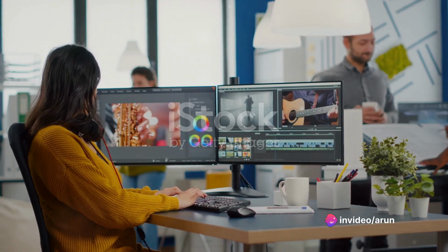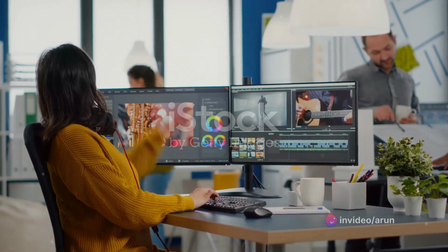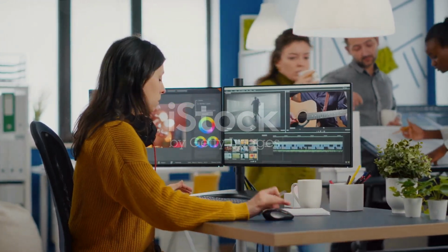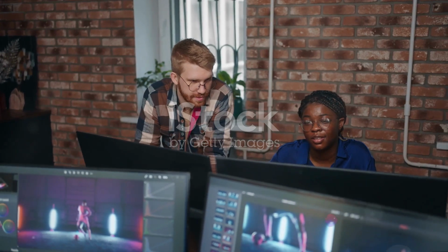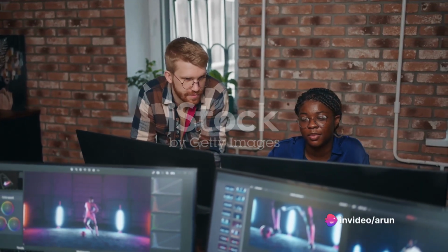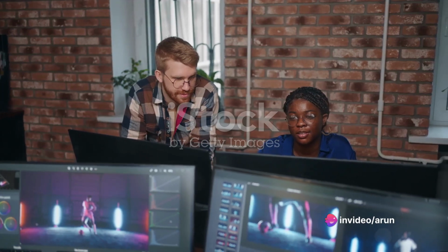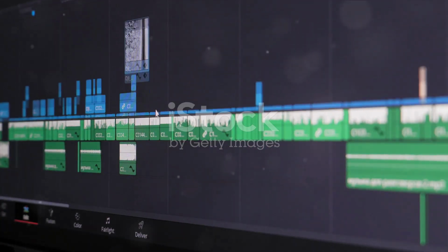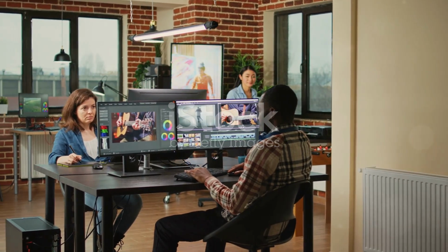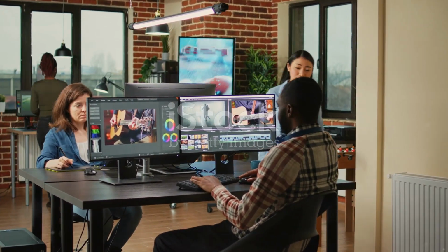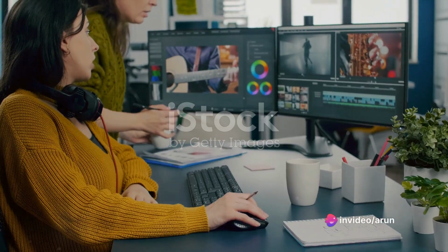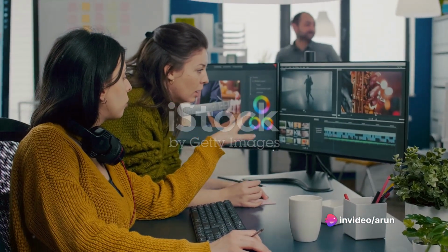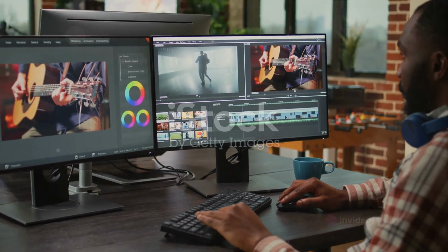To crash the schedule, you strategically hire additional resources, like 2 extra editors, to work alongside the main editor. Instead of having one person working on all the scenes, you now have 3 people editing different scenes concurrently. This division of labor allows for faster progress in post-production. It's like having 3 brushes painting the same canvas, each working on a different part but collaboratively creating the final masterpiece. So, by crashing the schedule, the team manages to speed up the post-production process.